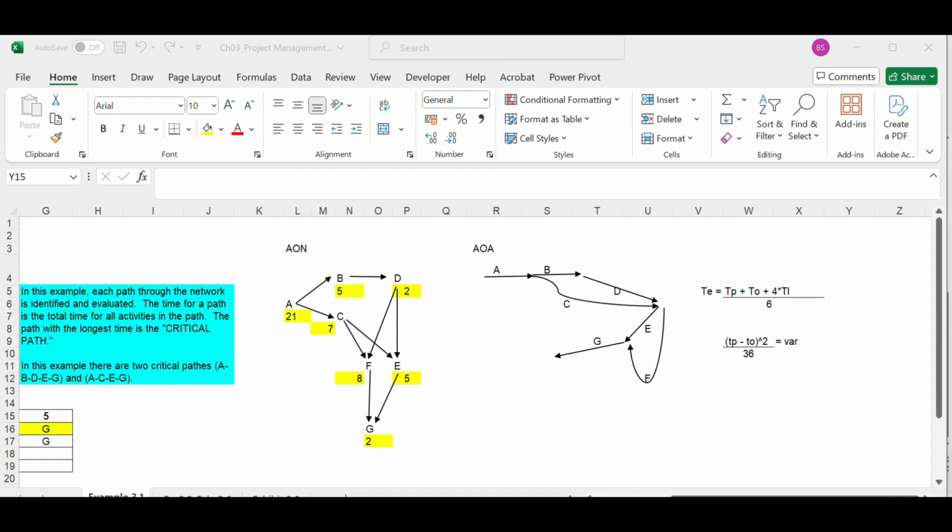Another law of estimation is that projects will accumulate delays and never accumulate gain. This is called Goldratt's law. This means that delays get cumulative but gains decrease. Some reasons for this law are the delayed pattern effect. For example, we are transferring a project from the project stage to the operation stage. There can be a delayed pattern effect, where the new department won't take charge.